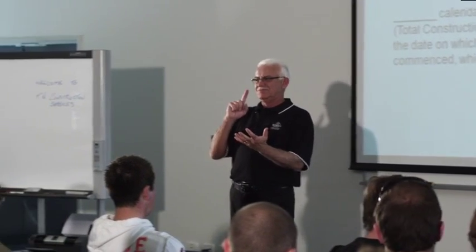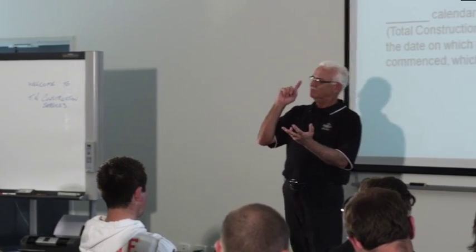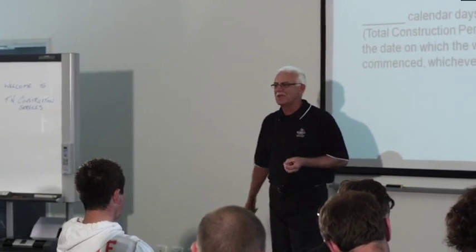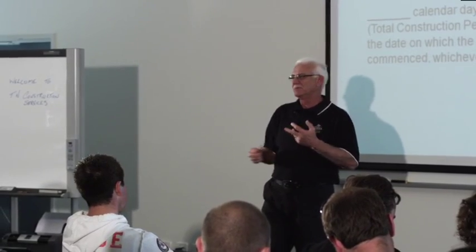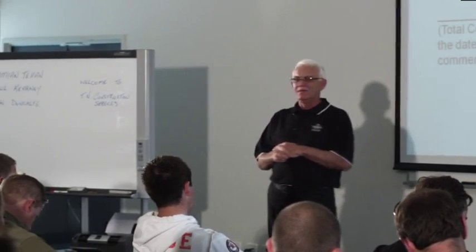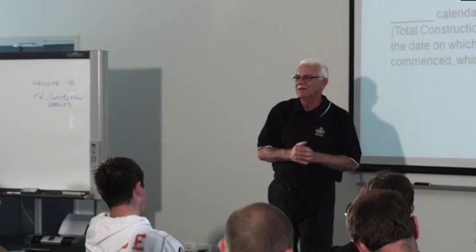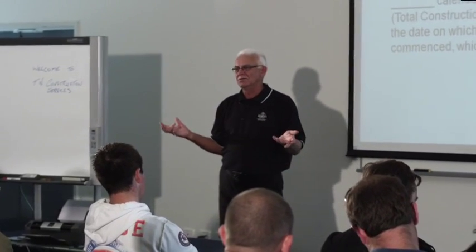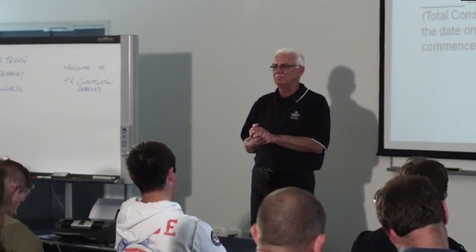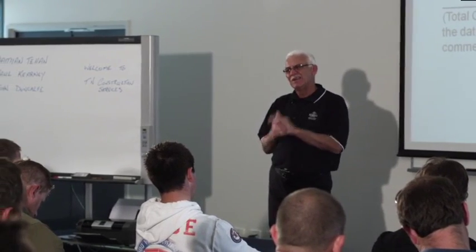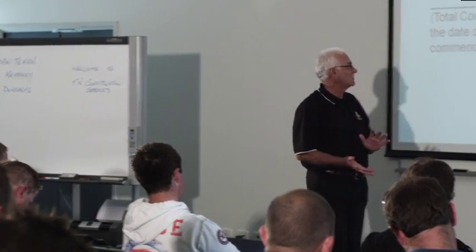because trucks are going to rock up, earth movers, landscapers are going to rock up, the concrete is going to rock up to put the driveway in. You're going to have a removalist out there, you're going to have a curtain person coming in, and then all of a sudden something goes wrong. You haven't finished on time. Very hard, very dangerous to put in a practical completion date.